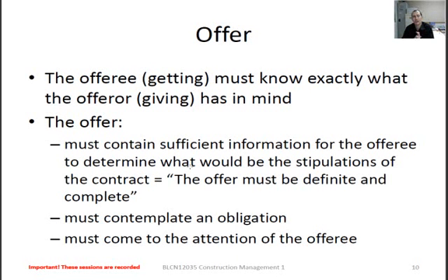Let's say, for instance, it's a design and build contract or an EPCM contract. Many times the contract execution will start before the designs have been completed. Alright, so this makes it a little bit more difficult for us to define. So that's where the professional services contracts and the hourly rates come in. Alright, because the more time we spend, the more we're going to pay, and the more uncertainty, obviously, the higher the price. The earlier on we want to sign the contract, the more risky it is, because the less information is available.